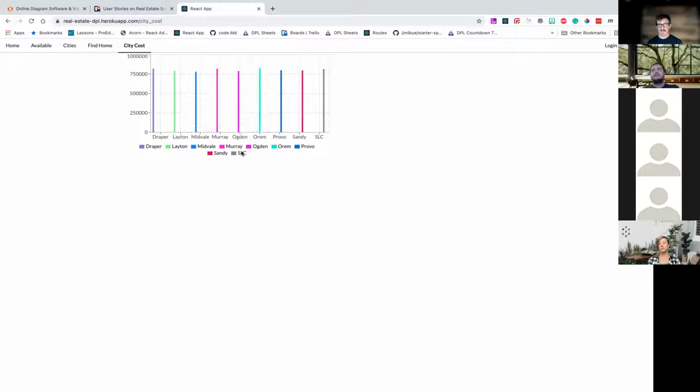Like if someone were to ask me how long it's going to take to center this chart, I'd say that would take me 5 minutes once I get into the code. But I probably have to do stuff with the Jira card, clone the repo, set it up. So I'd say a half hour, just to give myself the time to do all that other stuff. So keep that in mind.